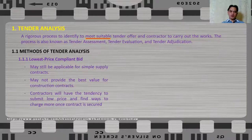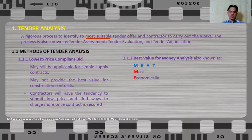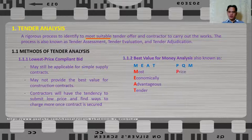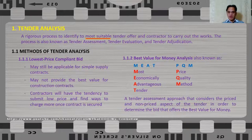Another method to analyze the tender is what we call the best value for money analysis, also known as MEAT — Most Economically Advantageous Tender. This is also known as PQM, or Price Quality Method of analysis. It is a tender assessment approach that considers both the price and non-price aspects of the tender to determine the bid that offers the best value for money.